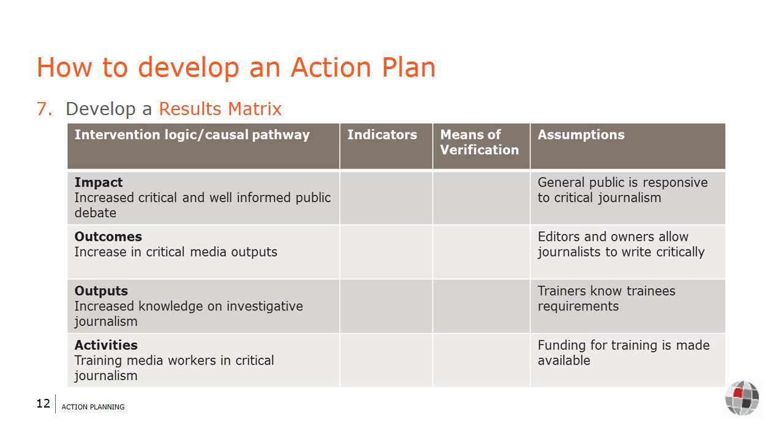Neither are risks or assumptions. Secondly, assumptions and risks are both outside the total control of the project team, or the team responsible for implementing the action plan. If the event is within the control of the project team, it is neither an assumption nor a risk. Then it should simply be managed to make it happen.